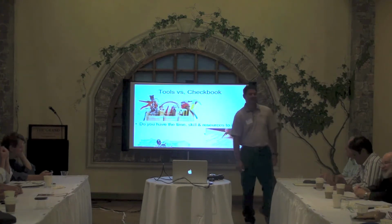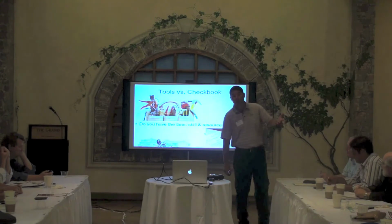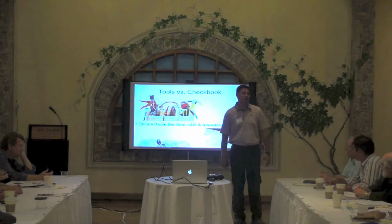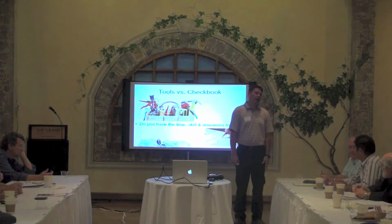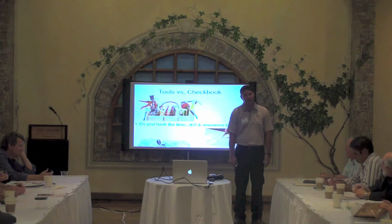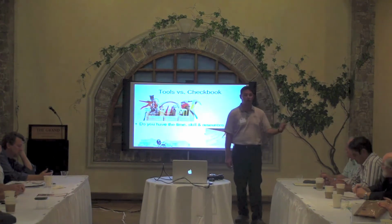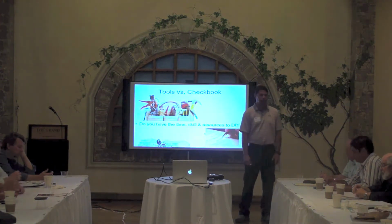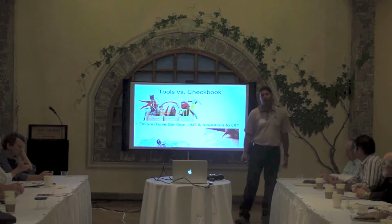No, I've heard that exact same thing. 10%. If you think you're going to spend $40,000, throw another $4 grand on it. Are you going to lose an offer because you knocked another $4,000 off of it? It might have been the best thing you did. Maybe that buffer was the reason why you shouldn't have bought that property, because it might have cost you 10 grand of something that you didn't see.